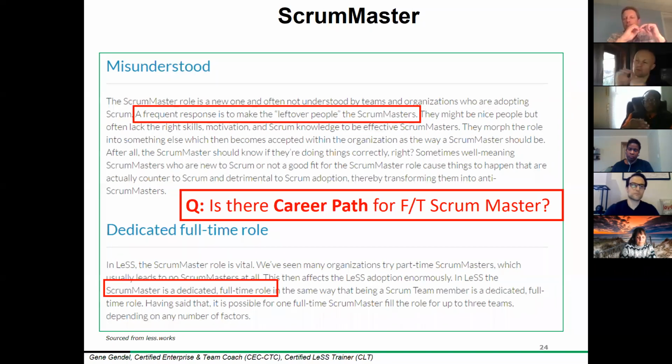And in fact, we do not enforce Scrum of Scrums. If you need to do it, you do it. Scrum of Scrums is not a framework, by the way. People sometimes misunderstand and think Scrum of Scrums is some sort of large monolithic framework. Scrum of Scrums is a simple coordination technique between people of similar interest and in a similar role, and we do it on demand.